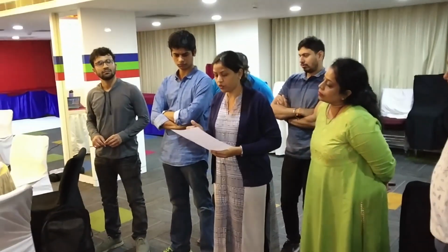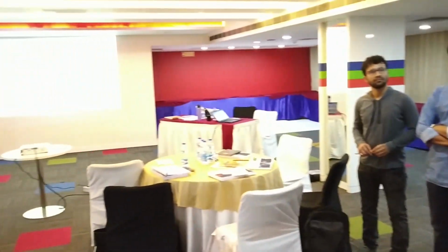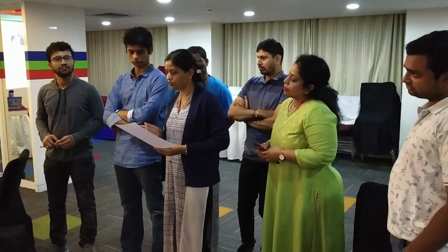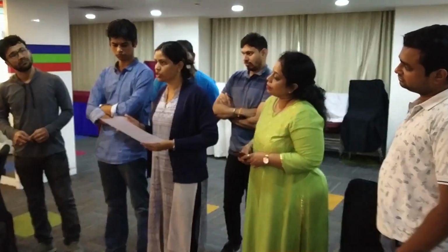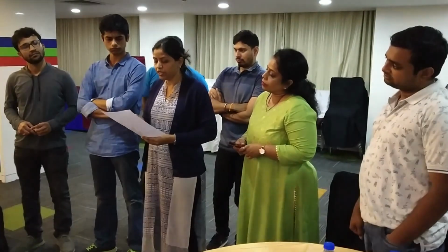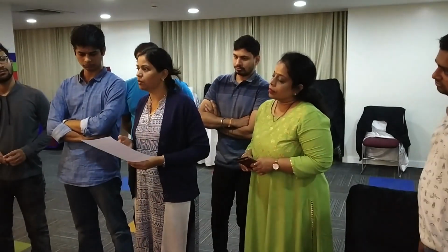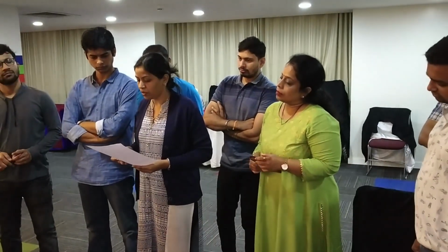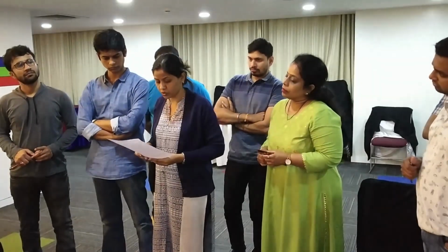Accordingly, we have estimated, for example, there were 45 days of schedule for the manned vehicle. We have estimated it roughly at 55 days for the unmanned vehicle. Similarly for cost and resources, from 1 million to 1.5 million, and 5 resources to 8 resources to build the unmanned vehicle. Similarly for parametric estimation, we have taken the historical data and added the current data. Current data, as Vijay rightly pointed out in his project, you take the inflation rate into consideration and make the appropriate addition. So for schedule, we have done 45 plus 8, which is 53 days, 1.3 million as cost and 7 as resources.